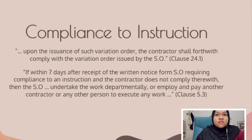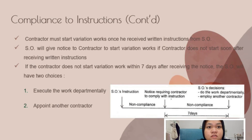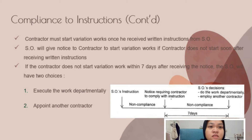Clause 5.3 - Compliance to Instruction. This clause explains that the contractor must start variation works once he has received return instructions from the SO. The SO will give notice to the contractor to start variation works if the contractor does not start soon after receiving return instructions. If the contractor does not start variation work within 7 days after receiving the notice, the SO will have two choices: first, execute the work departmentally; or second, appoint another contractor. Here you can see the timeline of compliance to instruction.